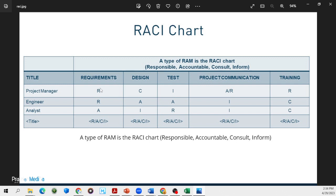In other words, who is the doer? When it comes to the requirements, we can see the project manager and the engineer — they're the doers. But who is ultimately answerable for the requirements? Of course it's the analyst. When it comes to the design, the project manager should be consulted, but the engineer is ultimately answerable.